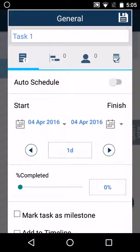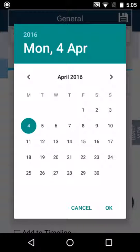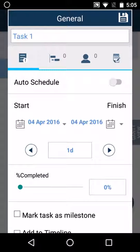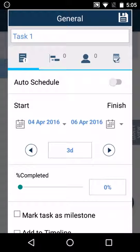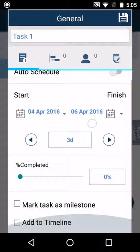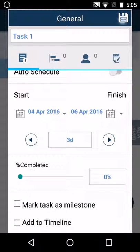You can change the start and the finish date of the task by clicking on the date and selecting a date from the calendar. You can change the duration. Let us say this is for three days and then click on save.